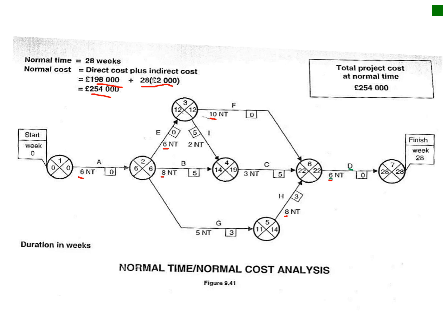That's 6 days. Then from here we can see that F is our next longest item, which is given at 10 days. Then working from there it's 6, and then from there on it's A, which is our other 6 days. So it's 6 plus 6 is 12, plus 10 is 22, plus 6 is 28 days, which I calculated there.